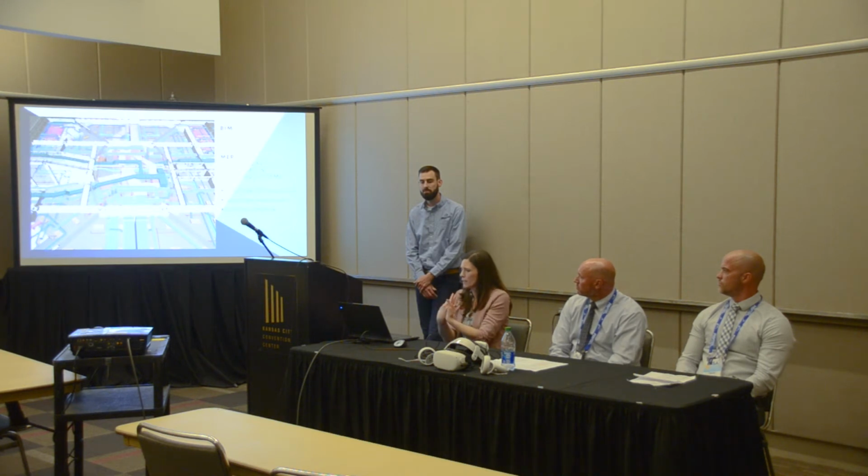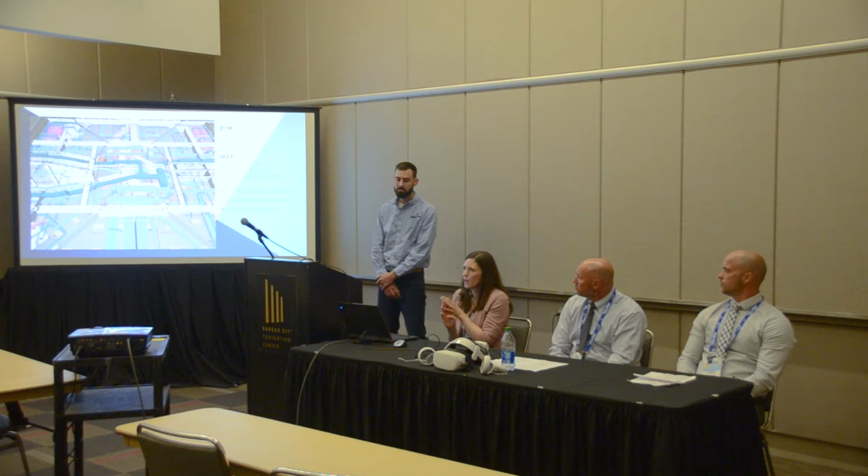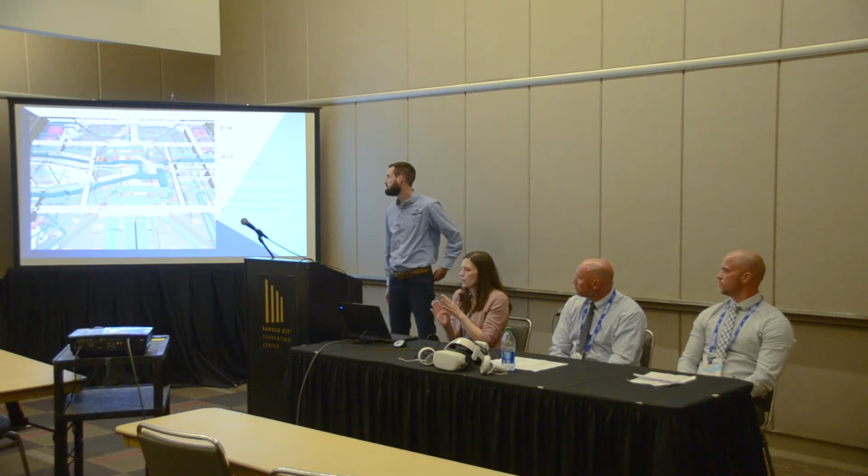And they hand it over to us and say, all right, contractors, how do you guys want to build it? Where exactly do you want to put things? And so we get together and we take the complex systems, the ductwork, the conduit, fire protection, all that good stuff, and model it in 3D. There just gets to be a lot of different things that you're trying to fit in a tight space.